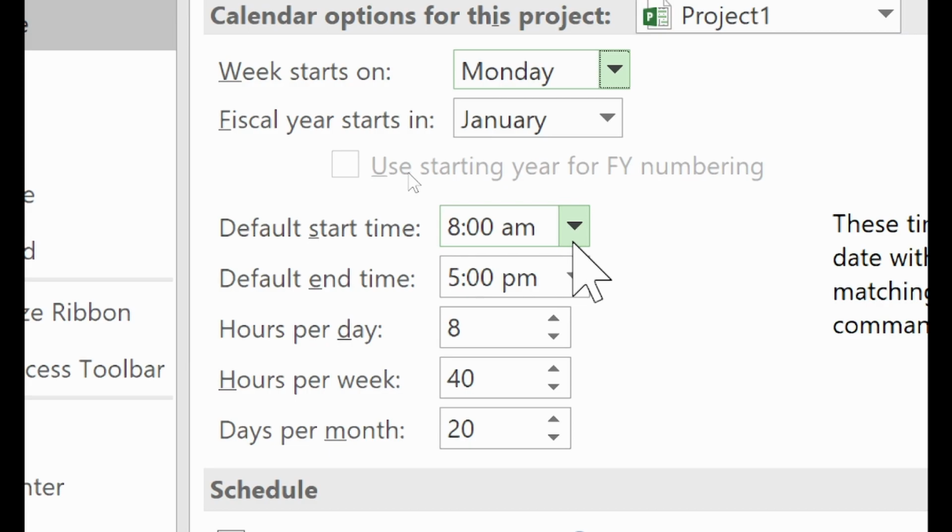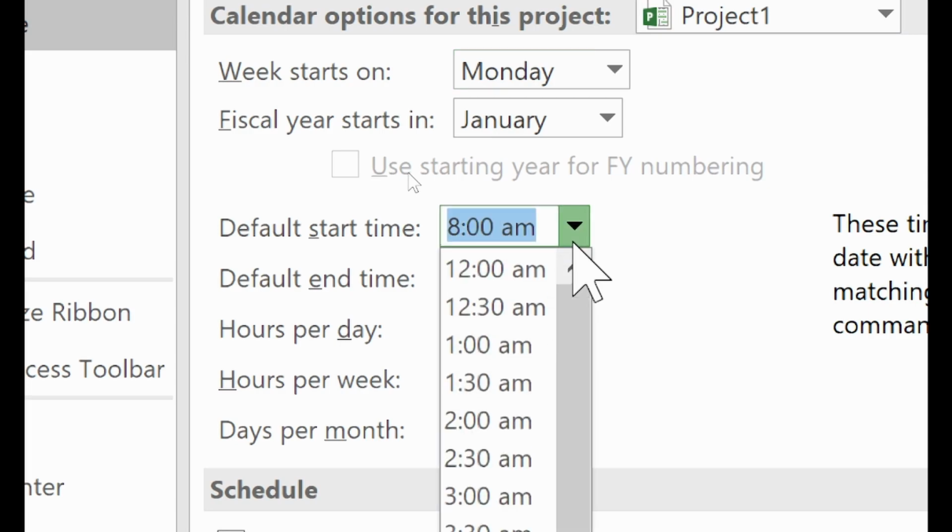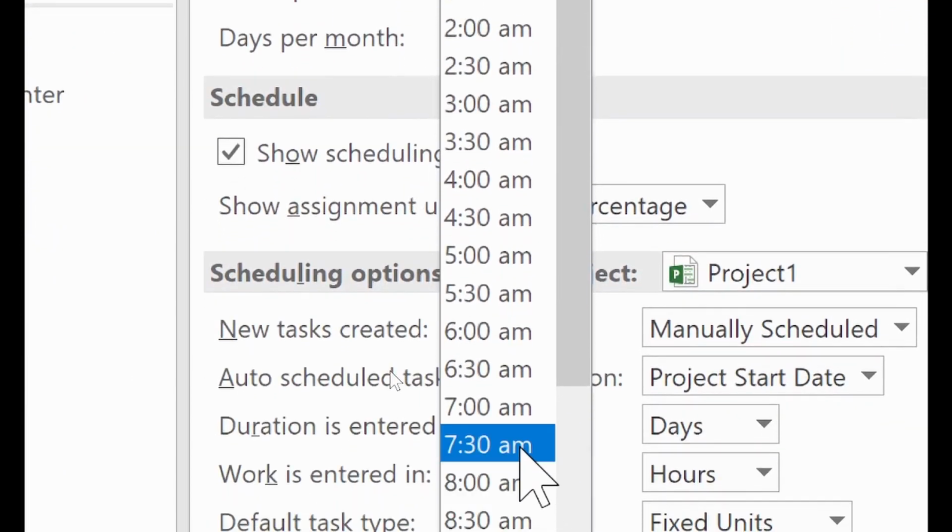8. Yeah. Okay. So will 8 be okay for all the masons to start work, or will they prefer to start earlier? Let's go back to 7. The official working time is 8 to 5, at least that's for the office. But this is something on a site, where people will be working outdoors. So if we say 7, it will be fine. So let's change it to 7.